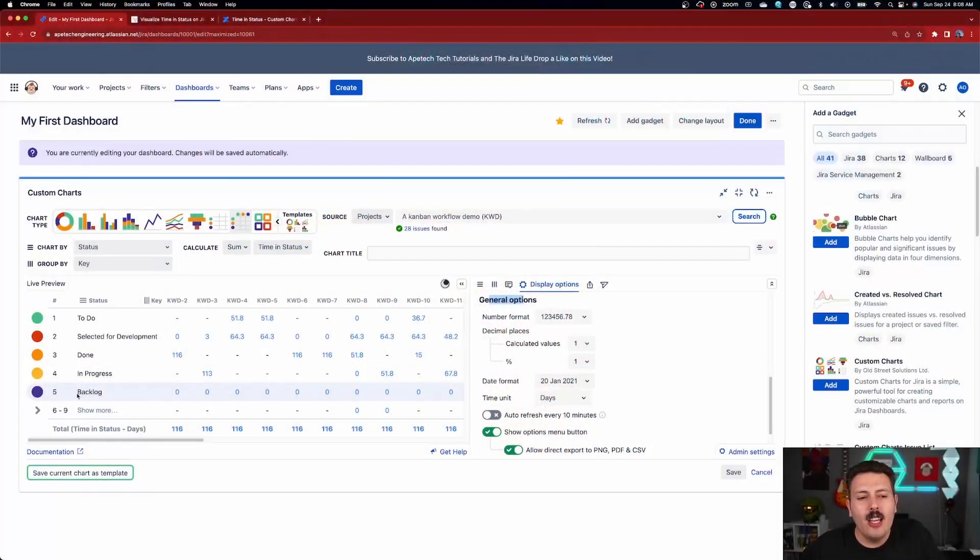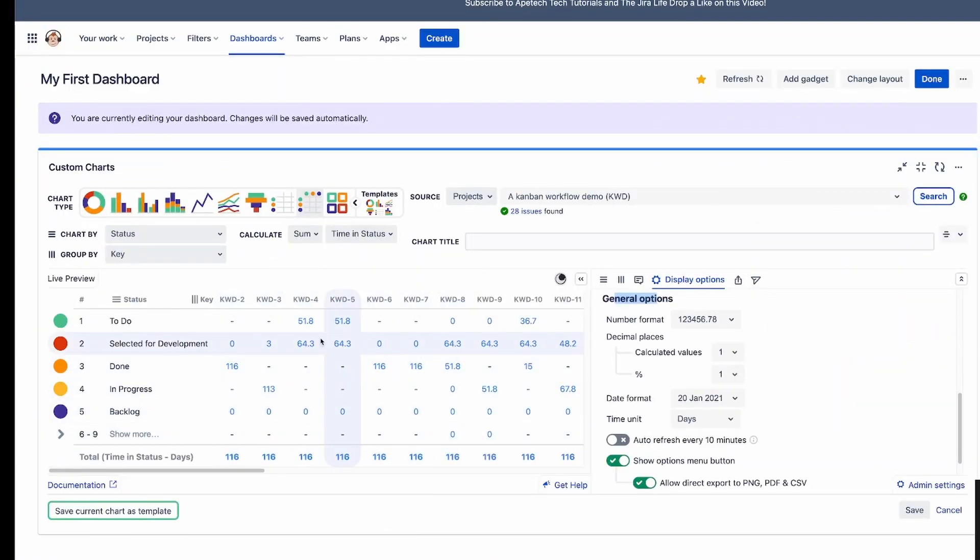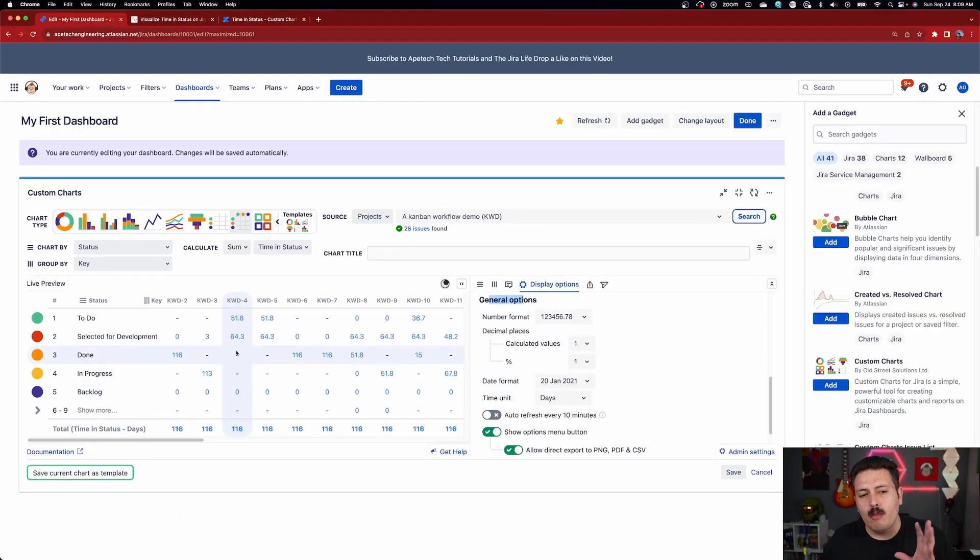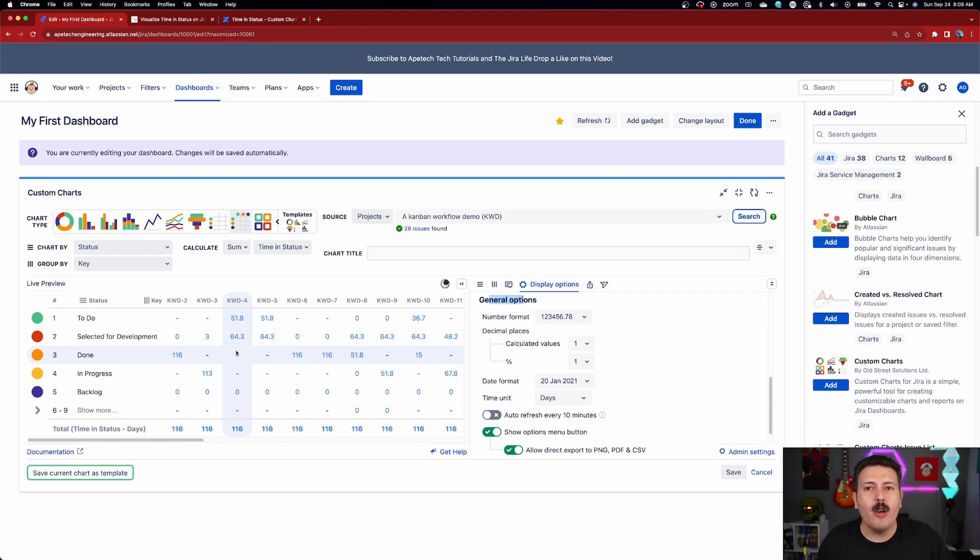Keep in mind that my issues are just demonstration issues. I don't actually use Jira here. This particular instance is just for training and tutorials. And so my numbers are just going to be total garbage. Hopefully yours are a little bit more representative of a real world situation, but in any case you are now going to be able to leverage these numbers. And so to do your cycle time, all you got to do is add this one plus this one and you're going to get your cycle time. Or you can add this one plus another one and you can get your lead time.